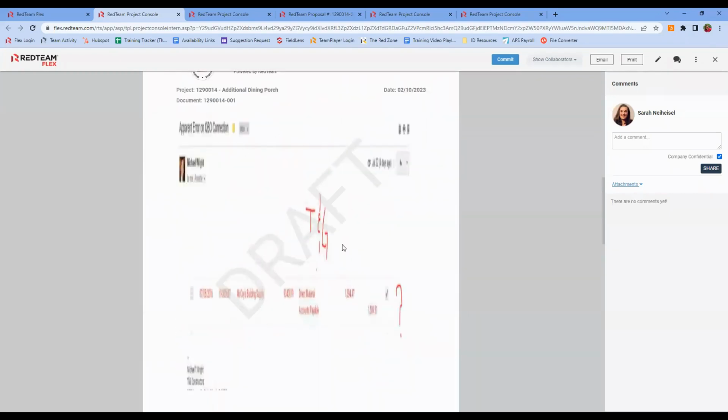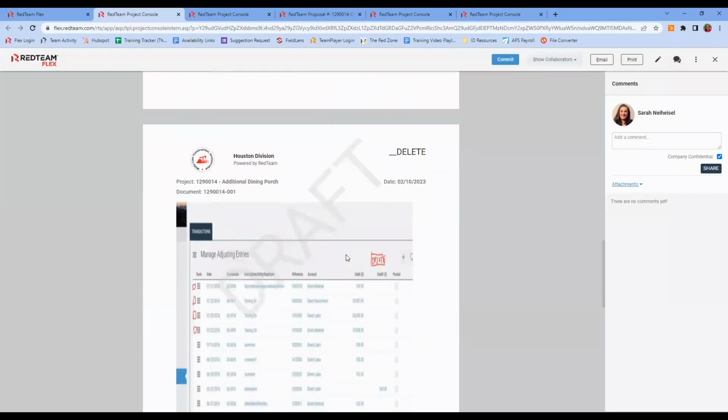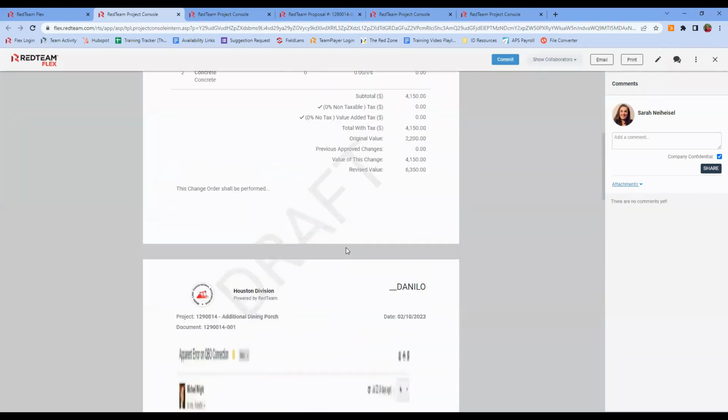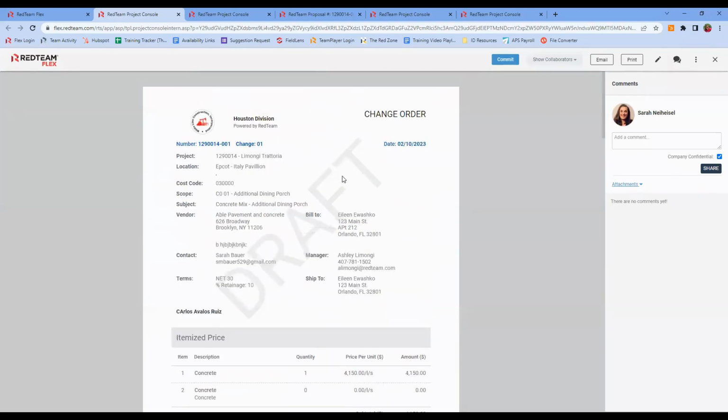And then any exhibits, right? We have some kind of sample exhibits in our purchase order, change order form. But you do have the ability to customize this form a little bit in your commitment forms section in configuration. So if we're happy with it, we'll go ahead and commit it and we'll email it out. If not, we've got the pencil to go back and make changes.